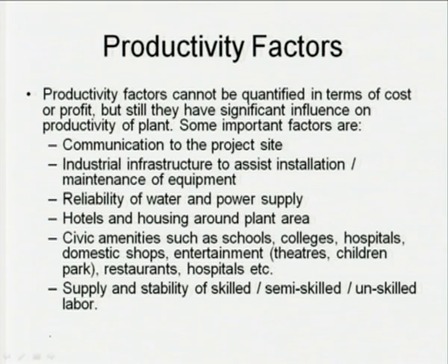Then the reliability of the power and water supply. As I already told, if the power supply is not uninterrupted, if there are frequent power failures, that will affect the plant productivity. Therefore, you have to have a captive power plant.